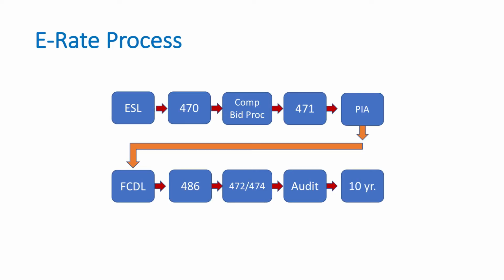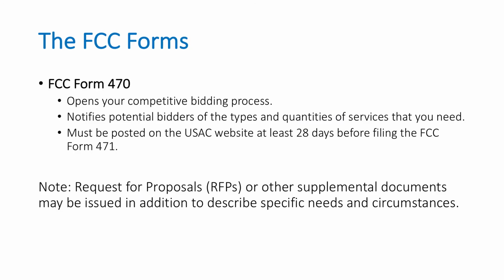And then you want to keep all your information, records, and everything for a potential audit in the future to make sure everything is up to par. And then the documentation retention policy is up to 10 years. That 10 years is after services have ended, so it's basically a very long time. So take that into consideration.